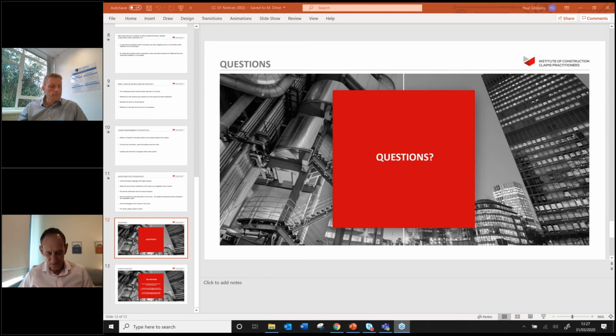Subclause 19.2, should we give a notice of force majeure? Now, the jury's still out under FIDIC on whether the coronavirus actually qualifies as a force majeure event, and my pendulum is swinging both ways. First of all, I thought FIDIC has 5 conditions that have to be satisfied, which it does, but then it goes on to list events of the type listed, so things like war, volcanoes, and my initial thought was it's not of the type listed. But doing a little bit more research, FIDIC are sort of saying in their User's Guide that it doesn't have to be of the type listed. So I need to do a bit more research on that, but the pendulum now is swinging the other way.